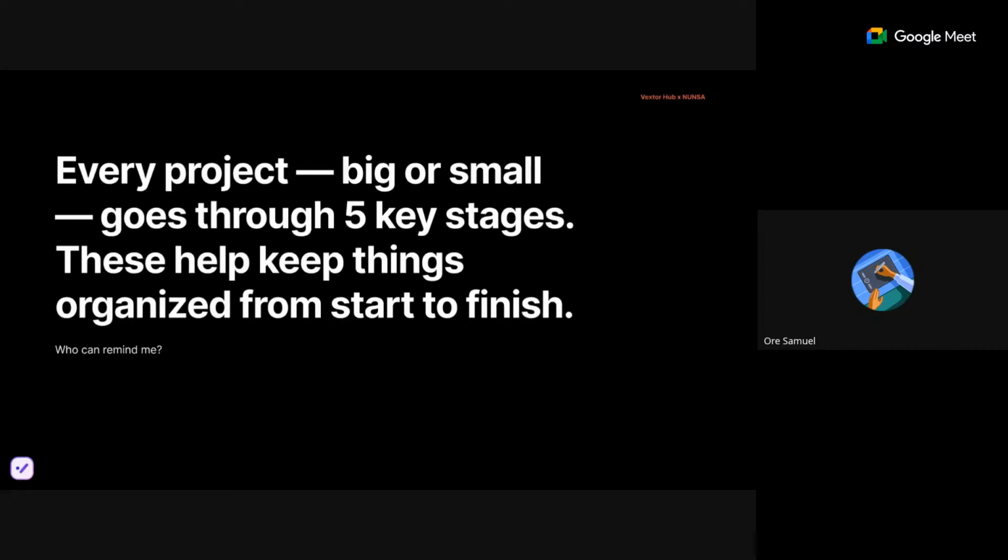I mentioned yesterday that if you go through this stage and you find out from one of your stakeholders or your clients that one of the most important things the person looks at in the event is food, making sure the food is enough, it should occur to you as you're planning to make the food of that event a top priority, because that is what would make the client satisfied. So it's like a cheat code, right? Even if some of the other things are not as perfect, as long as the food is there, the clients will be happy. So that's why this stage is very, very important.